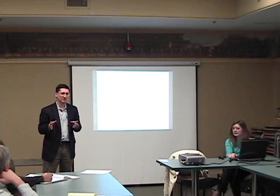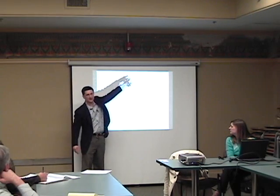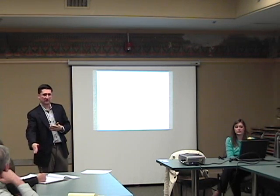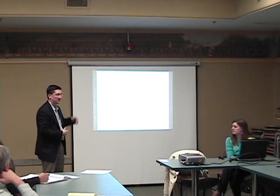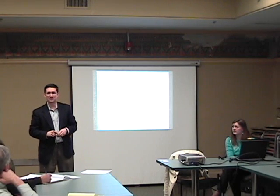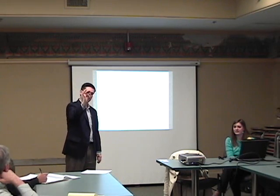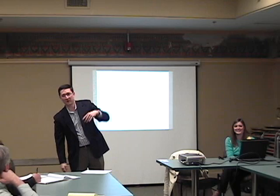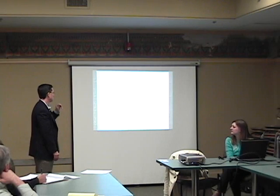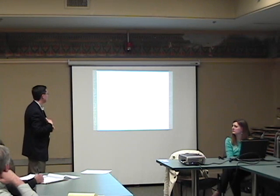What came out of the discussions with the contractor is, you can see here, $312,000. We started at $580,000. Once we clarified all the items, we took out any assumptions and allowances. It's $312,171, and I can say today we're still on that track. We've added $840 for new plumbing. The old plumbing was this big on the outside and about that big on the inside. It was absolutely disgusting, so it was the right choice to take that out and put new copper inside the building. We've abated all of the asbestos in the project, which was a personal decision of mine.